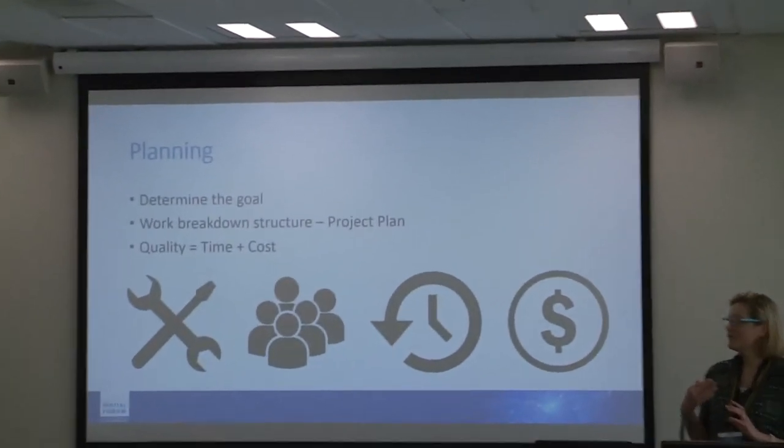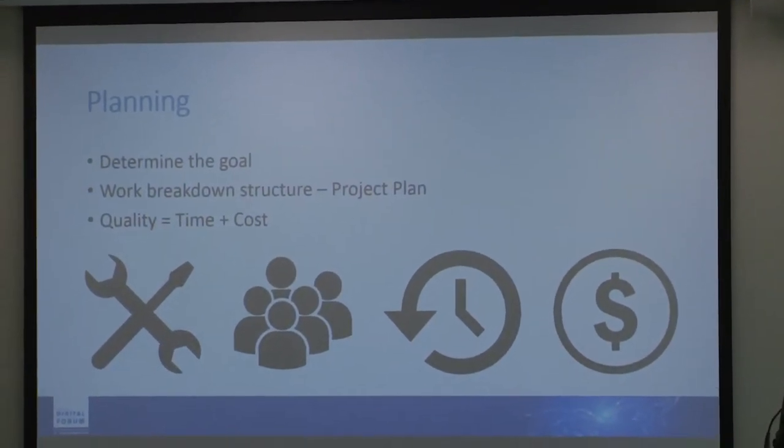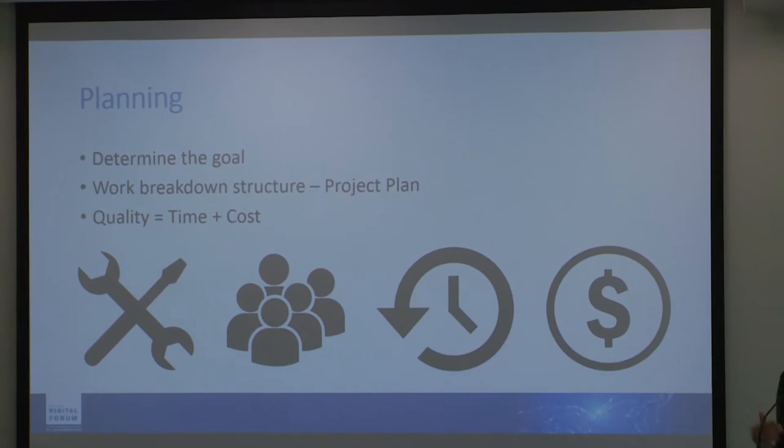So planning is a huge part of any project, and those of you who were in the previous session with Tim Barnett would have seen a massive couple of spreadsheets around how they plan their large project. So determining the goal was a huge part. Why are you digitising? And the intended use of the image at the end is a huge component you should be thinking of. WBS, work breakdown structure, so essentially a project plan, determine the scope, the resources, develop an estimate